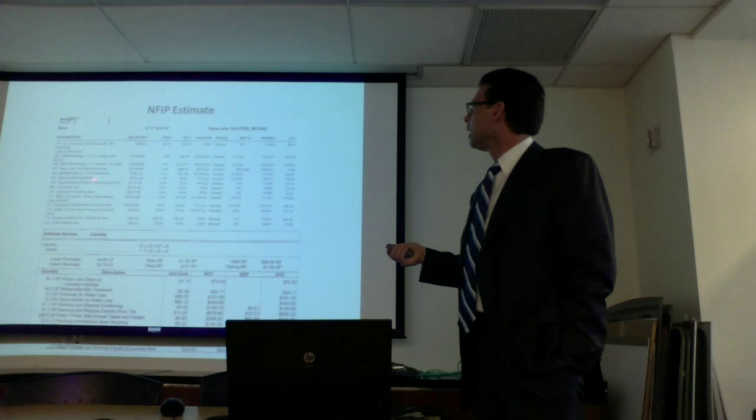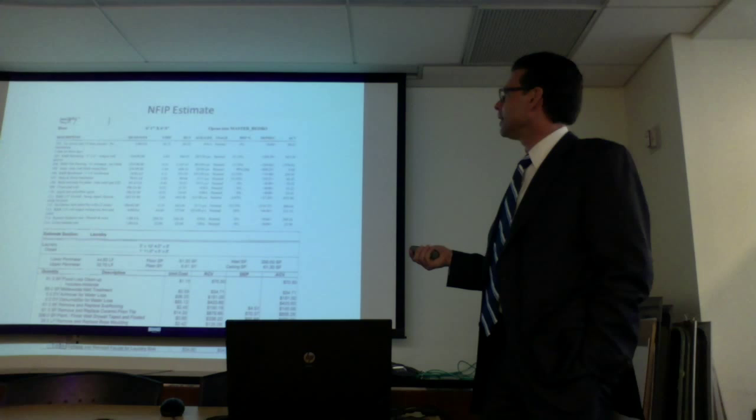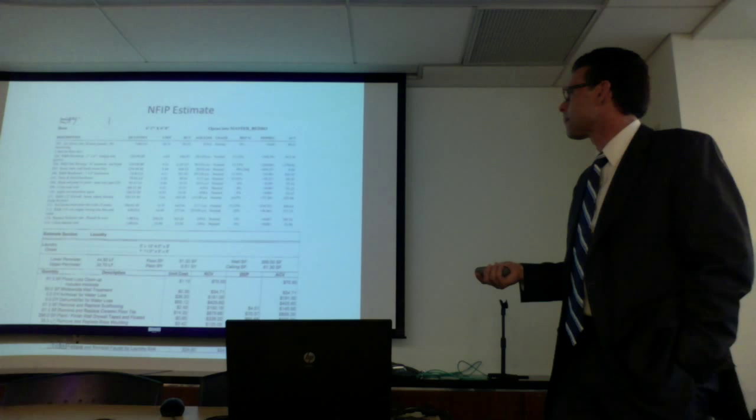R&R drywall, hung, taped, floated, ready for paint. It's assuming you're doing the whole room. You're not. It's assuming it's dry. It wasn't. This is for a flood cut. It's wrong in every sense of the way.